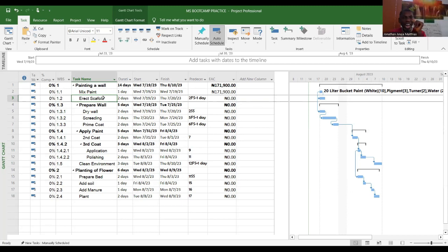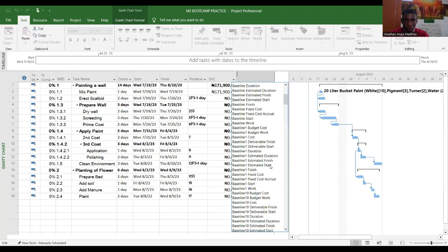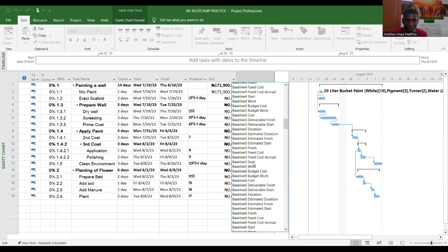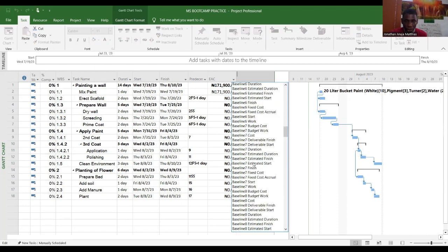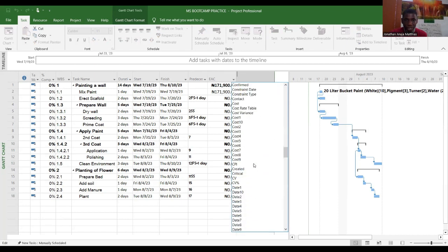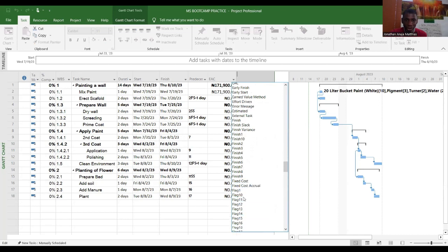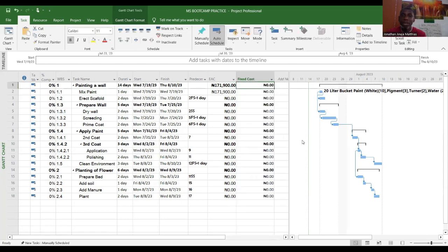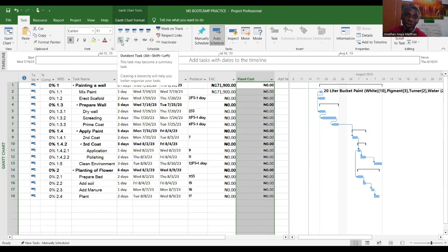So I can just apply an amount. Let me bring out, there's a portion called fixed cost. What you use for that is your fixed cost. It will still be adding to your total project money. So let me go to F. F is fixed cost, right? So the cost of renting is fixed. I can just use that column to assign resources here. Fixed cost, yes, I'm there. Can you see? So every item can actually have a fixed cost.